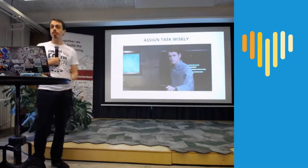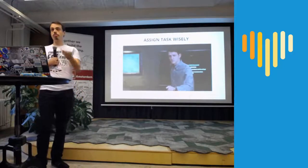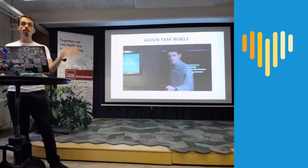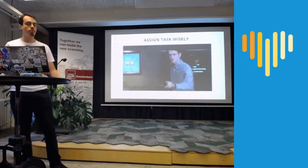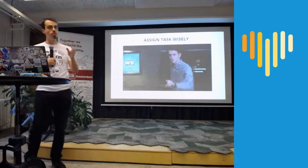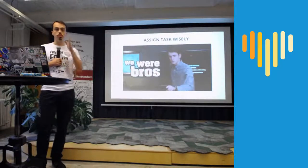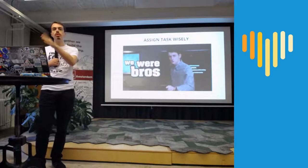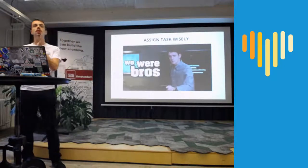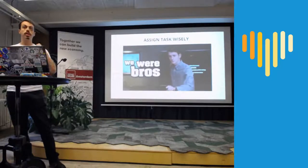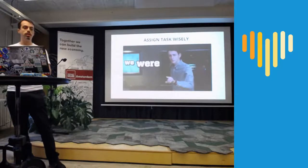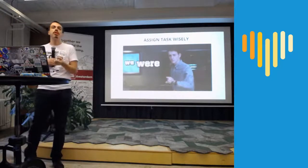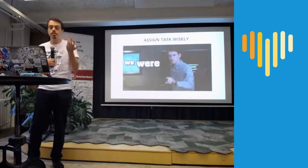At the same time, you need to assign tasks wisely. It happens often, for example with Hacktoberfest, that people say they'll do a task but at the end they don't. So I usually say: go ahead and do it, then I will assign it to you. In that way I shift the responsibility to the contributor rather than having it sit unassigned with no timeline.